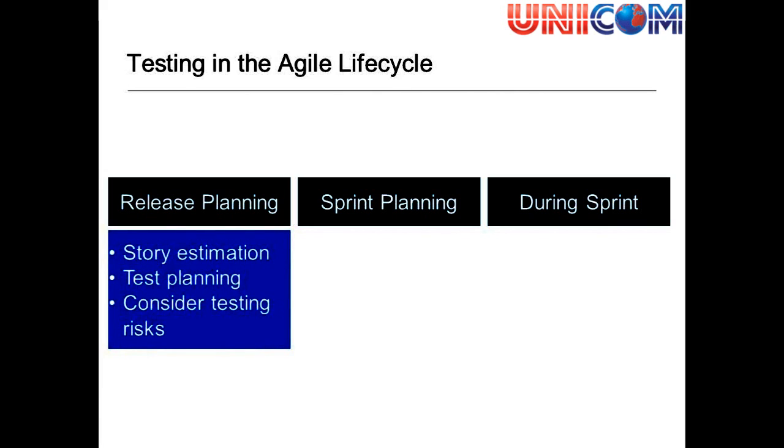Release planning, so story estimation. We've got these user stories, and as a tester, you must be part of that. You must be considering the testing impacts for each user story. How complex? How will we test it? All these considerations need to take place. You will need to do some test planning and think about some of the more complex user stories later down the line.